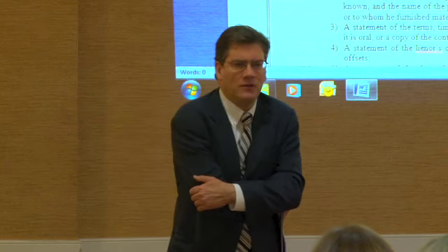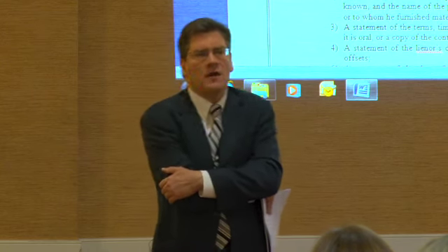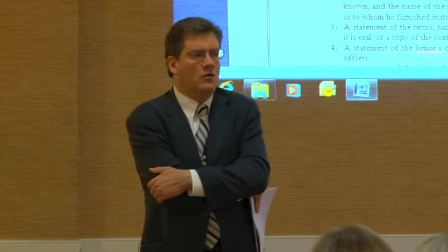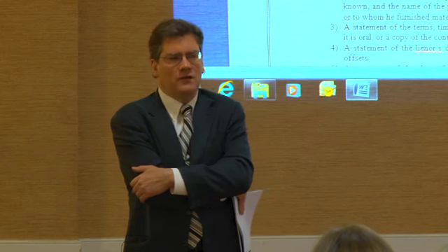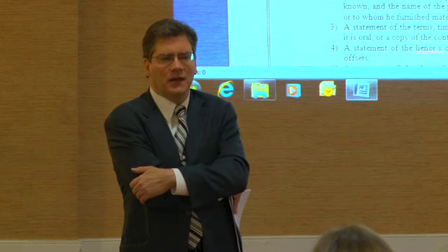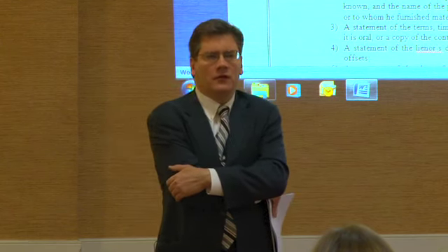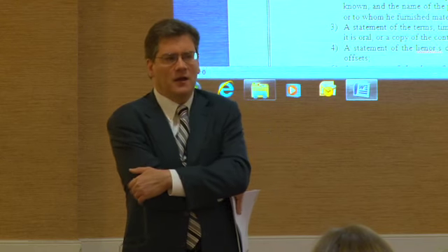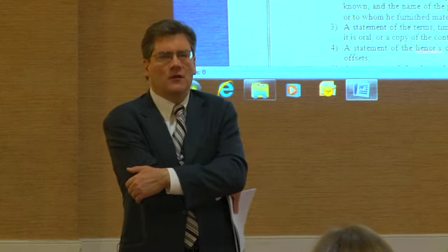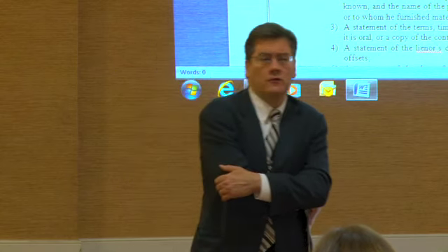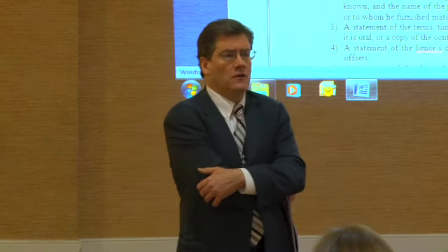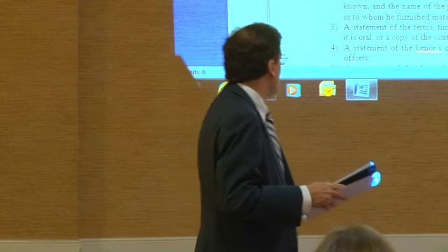Now, one client had me draft up a letter that goes to the owner of the residence and says, look, I need you to sign this, that you will guarantee the payment of materials on this project, or else we're not going to supply. That's a little dicey. That can cost you a relationship, and probably in half of the instances, it will cost you the relationship on that project. But it's an option.